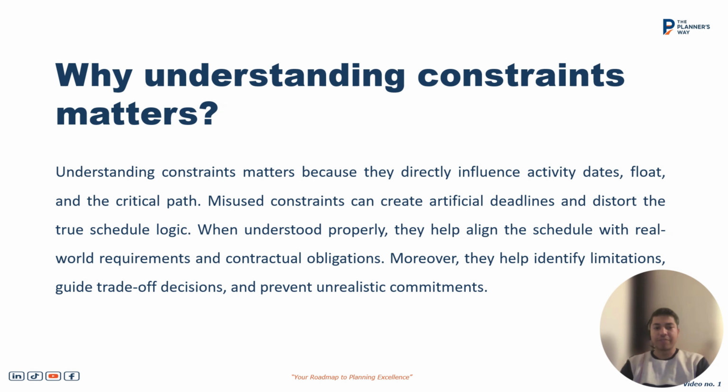Understanding why constraints matter. Constraints matter because they directly influence the activity dates and float of the critical path, which mirrors the project, showing at what time the project will complete. So as the constraints have a direct impact on the critical path, we need to analyze and understand the constraints in a better way.